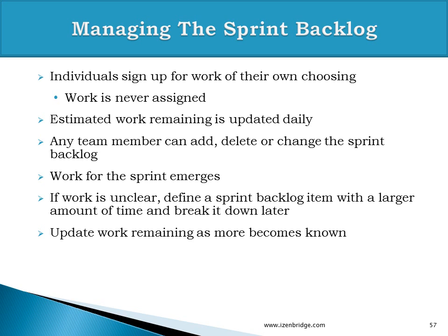Any team member can add, delete or change a sprint backlog item, and because they can add, delete and change, the sprint backlog is emergent in nature. It is not necessary that during the sprint planning meeting you have detailed tasks constituting the sprint backlog. In the beginning of your iteration, you may have a task at a higher level, but as you move forward, they may get detailed out further.